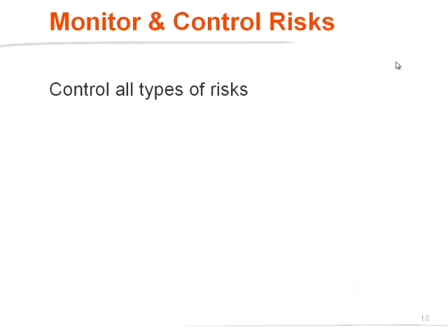No, what I do is information correlation. I try to remember everything which I learned from discussions, from meetings, from emails, whatever documents, and I relate it to the risk list and see, does this produce some new information? Should I talk to somebody about that new information? Does it give me a new way to handle the risk? I just correlate. And if there's nothing new, okay. But a lot of days there's some new information, and I take that new information when I talk to somebody. And so it goes round and round and round. I get information, I correlate, I give out information.